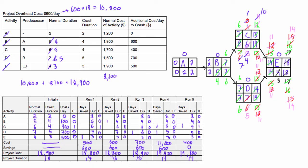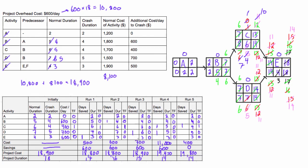But if your teacher was maybe asking you to save the most amount of money for the project overall, then you would actually see that the cheapest you can do this project for would be $18,800. And you might as well do it in 16 days because it's always better to finish early, right? So anyways, it really depends on how the question is worded. And just showing you that there's lots of different ways that you can go about solving for the answer. But this, again, it gets messy, but now you know how to crash a project.